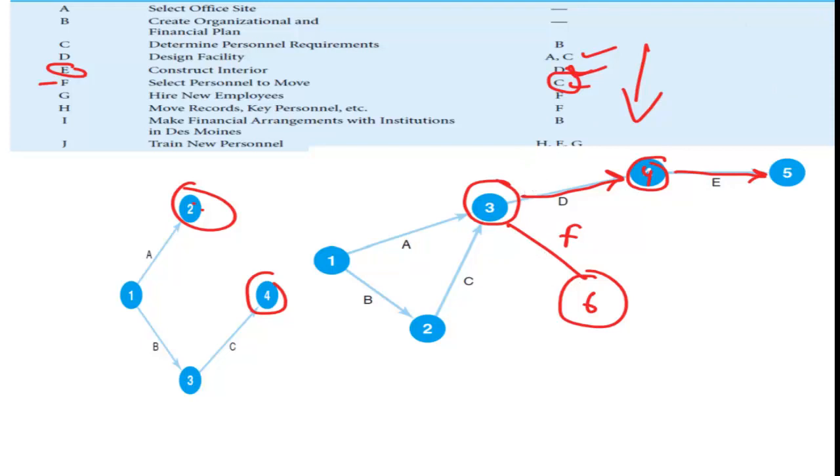Here is where what's called a dummy activity comes in. Now what is a dummy activity? It will solve this diagrammatic dilemma: we introduce another activity, shown by dashed lines, which provides a pedagogical device so that we can draw our network representation correctly. It does not have any cost attached to it, a cost in terms of time or resources. It will not have those things attached to it.